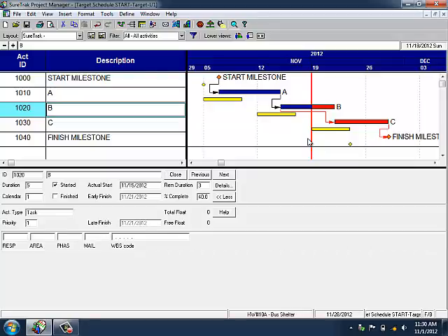They handed him 2 printouts, 11 by 17, in an owner's meeting every other Tuesday, and he'd go down with his finger and look for every progress bar that was to the right of the yellow target bar. They said, all right, talk to me about these things that are behind schedule. And in 15 minutes, we reviewed 2 11 by 17 printouts on a $95 million job in an owner's meeting. He thought this is the greatest thing he had ever seen, ever. And it was the first project in DOT history to go CPM.